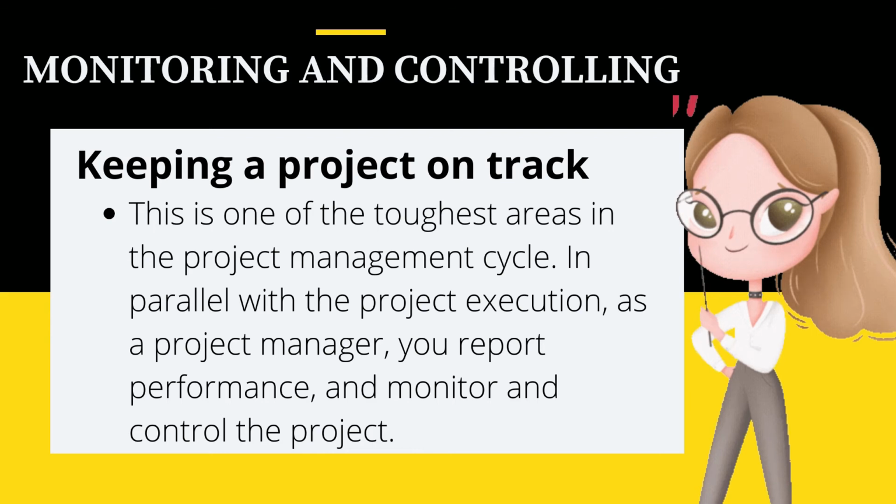First, that means ensuring you capture the data, and usually this is derived from timesheets and tasks completed to track progress effectively against the original plan. Secondly, it means taking the data and comparing the task completion, budget spent, and timeline allocated in the original plan.